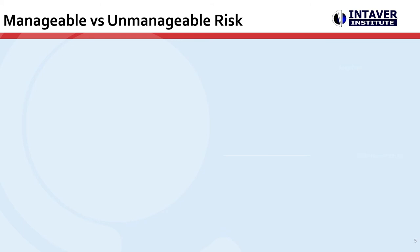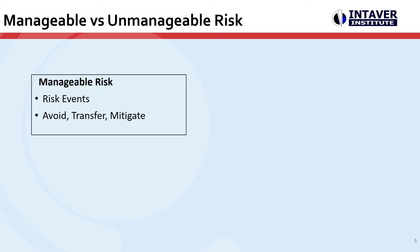Manageable versus unmanageable risk. Through the analysis of risks and uncertainties, two types of risk emerge: manageable and unmanageable risk. Manageable risk is the impact of risk events. This risk can be managed by either minimizing the probability or impact of the risk. One aspect of this management is mitigation planning.